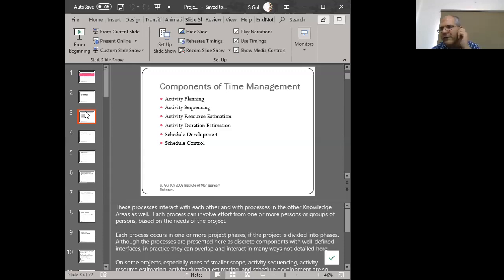So what if we have two people, right? If we've got two people, then we've got one person doing 8 hours, the other person doing 8 hours in a day. So that's 16 hours. 16 plus 16 on the second day is 32 hours. So two people is not enough. What if we've got three people? If we've got three people all working full time, that's 24 hours in the first day, 24 hours in the second day, that's 48 hours. So that's 8 more hours than what we require in those 2 days, where we're looking for 40 hours of work. So when we start thinking about activity resource estimation, we're trying to think in these terms as to how many individuals are needed.